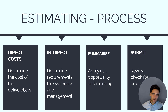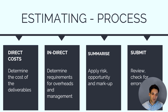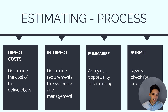The process for putting together an estimate is relatively straightforward, however it will be very specific to the type of project you're working on. The first step is to estimate your direct costs — the costs of completing the physical construction works. Once we estimate our direct costs, we can then work out our indirect costs — the cost to manage and supervise the works. We then work out our risk and opportunity, apply a profit margin and markup, and get a sell price we submit to the client.